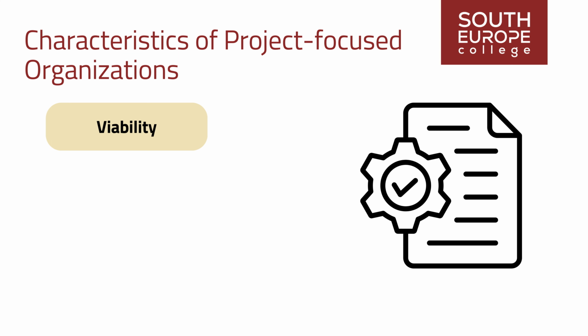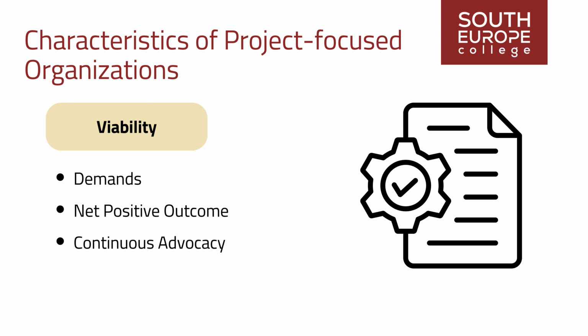Viability. Because each project is independent, greater demands are often present regarding its return on investment. Whether designed to meet a stated need, address a problem, or turn a financial profit, projects in this environment must consistently demonstrate the potential for a net positive outcome. Because of this, projects that exceed resource or time constraints face cancellation. Even projects on track are regularly compared to other projects to decide if they remain a solid investment. This reality often requires the project leader or sponsor to continuously advocate for the project within a larger organization, which can take time away from managing the project.